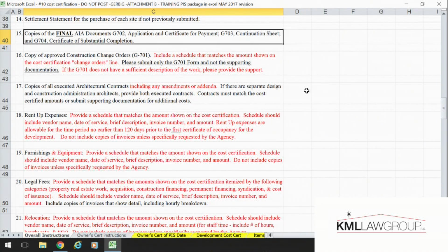So I know oftentimes, for example, I may get an invoice from some place, I don't know what they're called, for a single $1 amount. But like an installment of $30,000, and I don't know what you bought for $30,000 or $50,000 or whatever. So we do need to see the breakdown. Give us a ledger that says you bought 2 ottomans, and those ottomans were blank each or whatever. So make your schedule as detailed as possible. It'll expedite things, and that way we don't have to ask quite as many questions.